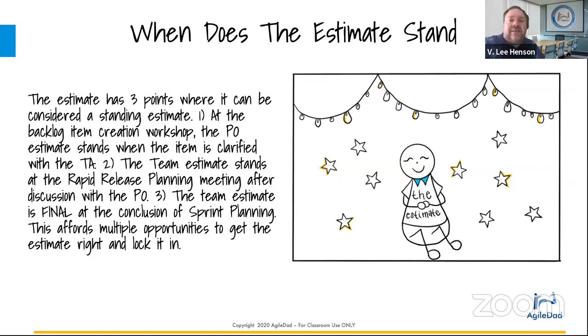What about estimating planned discovery items that'll help us technically understand a future epic? So if you're doing discovery items that are planned, either A, we should try to do that inside of our 1 hour session for refinement, or B, we should add that as a backlog item that goes into a sprint.